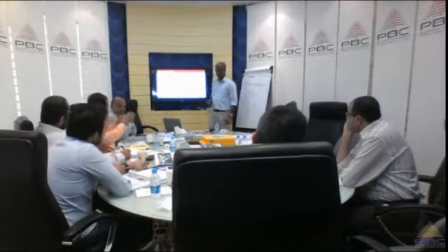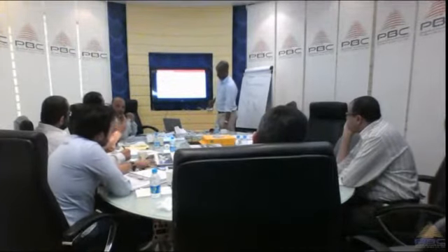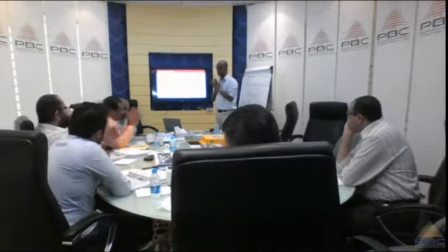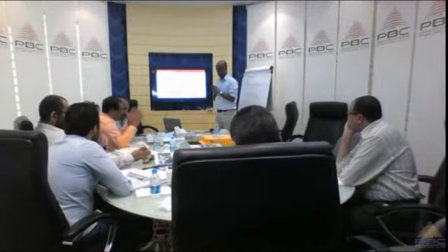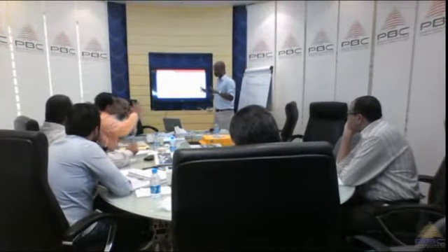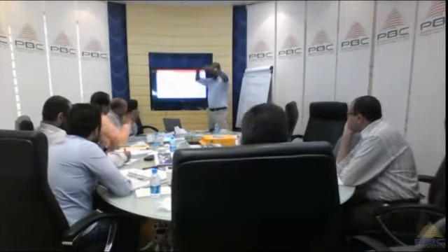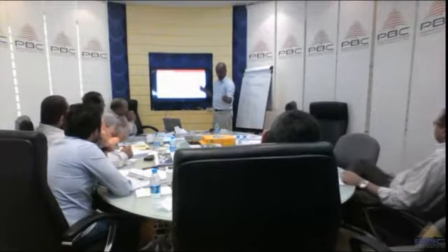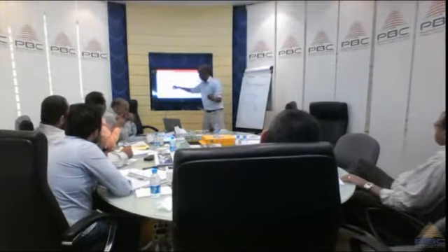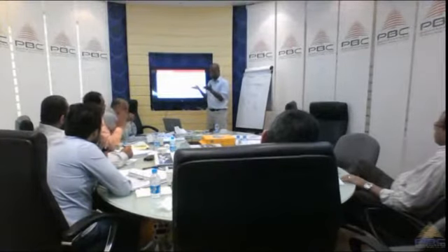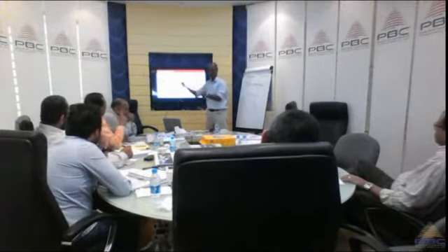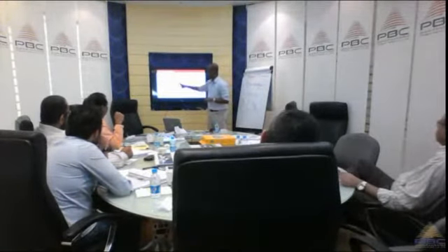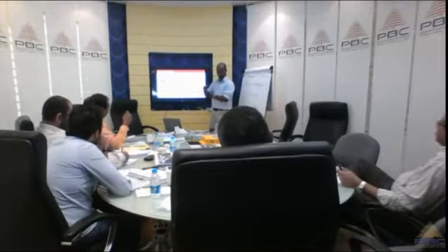When we go to the site, the actual input is coming from there. That actual data. Sometimes we have parameters for calculating the duration of the activities. Okay. Don't go into details. Just stay at the high level, very simply. So you have your schedule baseline, your plan, with your actual data collected. You compare the two. If there's any variance, you act. No variance, business as usual. Okay. So this is called the performance review.